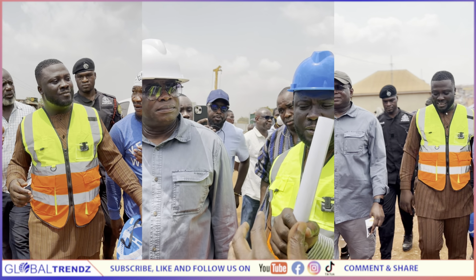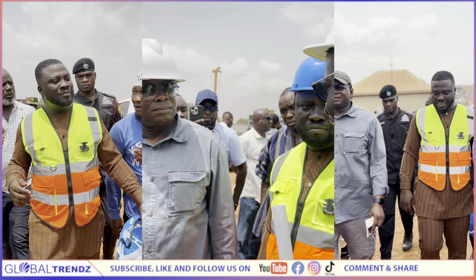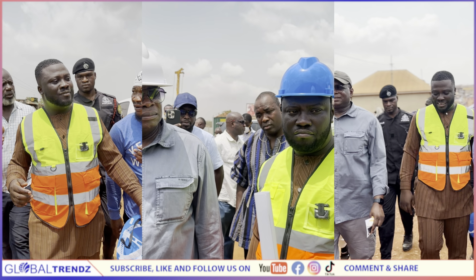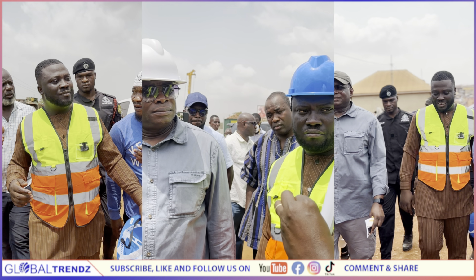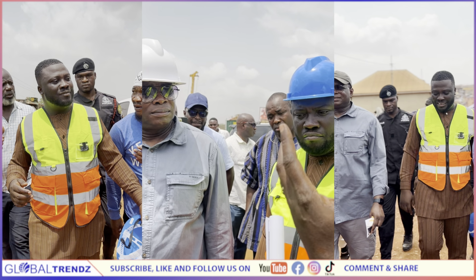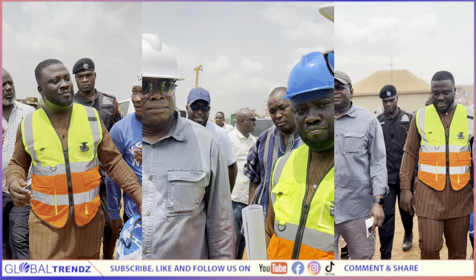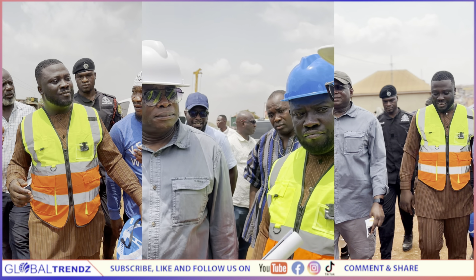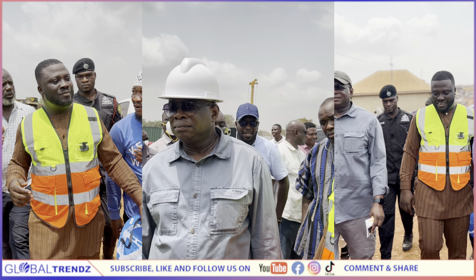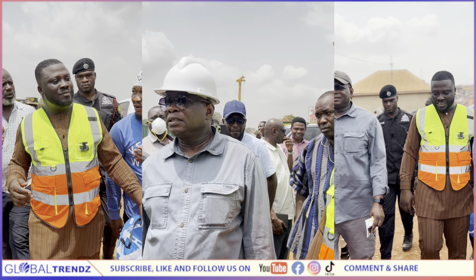What is the problem? They said that they are in the period of the dry season and they don't get enough water to serve the community. So they give the time to us on a piecemeal basis. Once in a while, they will agree with us that on this occasion, we can allow you to cut this line and connect, and that is how we have been. Otherwise, we should have finished all the relocation works with regards to water. Right.